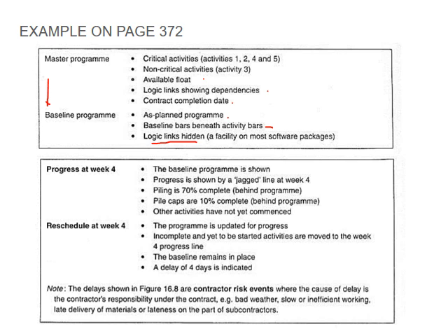Now we get to the progress. At week 4, the baseline program is shown. Okay, the progress is shown with a jagged line at week 4. Piling is 70% complete, behind on program. Your pile caps is 10% complete, also behind on program. Other activities have not yet commenced.